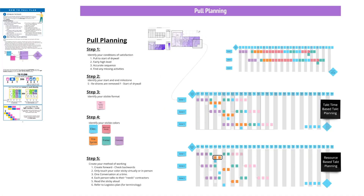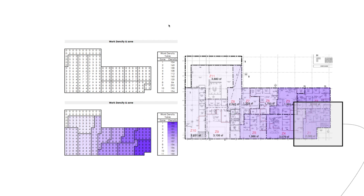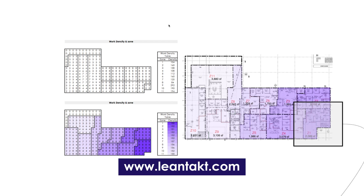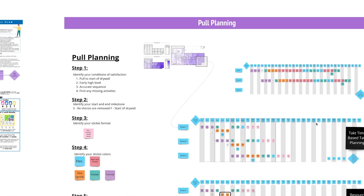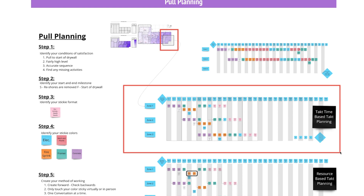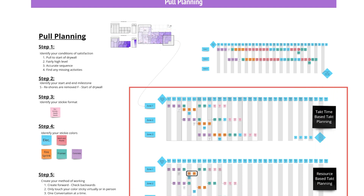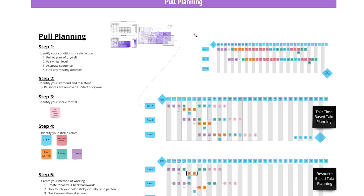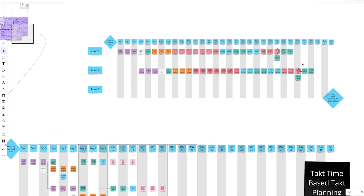Step two: identify your start and finish milestone. Here we said reshore removal as the start and start of drywall as the finish. Step three: establish the sticky format. On Miro, we used duration, activity, and needs. We also identified sticky colors for each trade. Then define your method of doing work, and you're ready to start the pull plan.